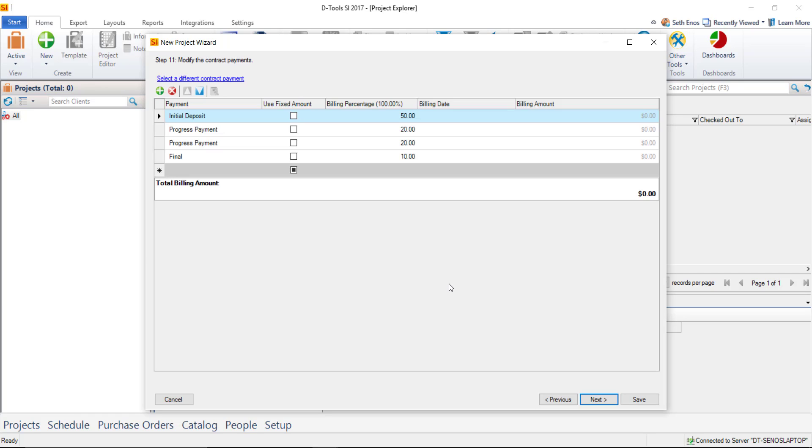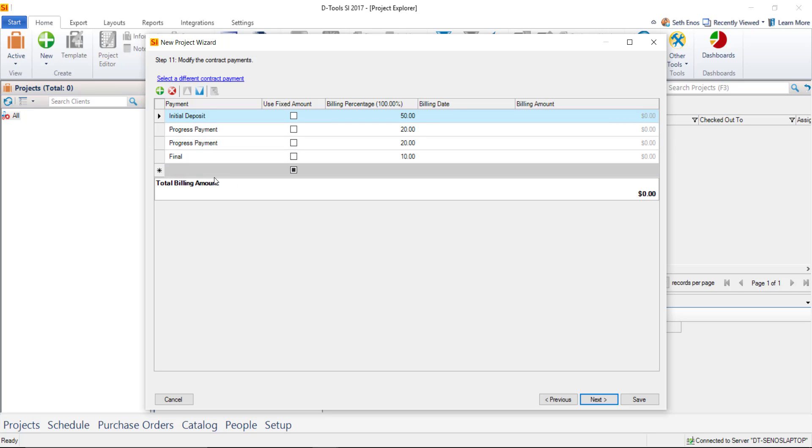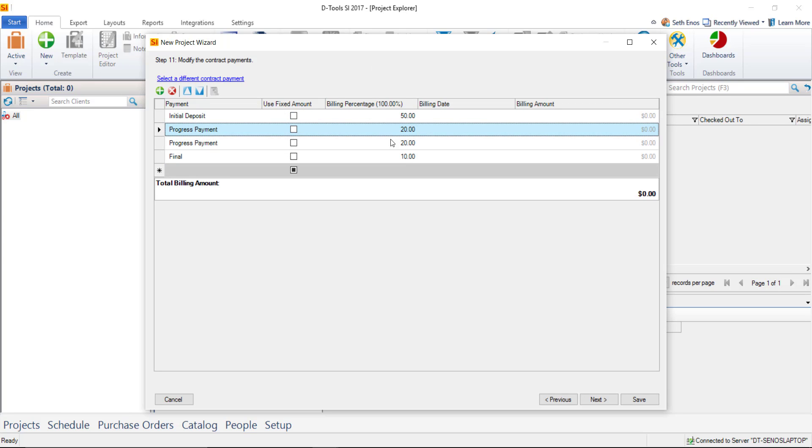The next step here would be to modify the contract percentages. And these contract payments or percentages, it's something you absolutely can set up under the control panel. And here you can even select a different contract payment if you've set up multiple defaults out there where this might be for a residential job and you might have a different one for a commercial project. If you want to just modify the one that's right here, you've got add and delete buttons here for adding lines. You can always just pick one of these and delete it. If you're doing a percentage-based billing, you just want to make sure that this column equals 100% before moving on. You won't be able to move on until it does. I'll leave the default contract percentages here for now.